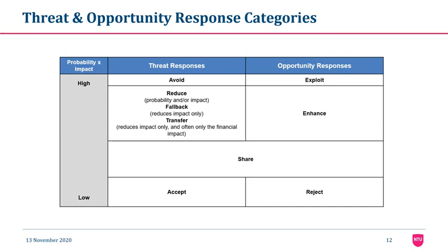An example for positive risks, let's say a new technology is emerging that will help you to save time in this project. You can ask your client to invest in this technology, and basically you share this positive risk with the client, and both of you can take advantage of using this technology. You will build the facility faster, and the client gets more value for its projects.